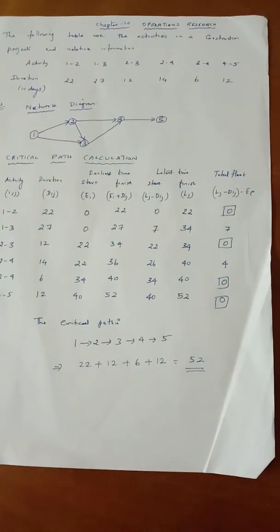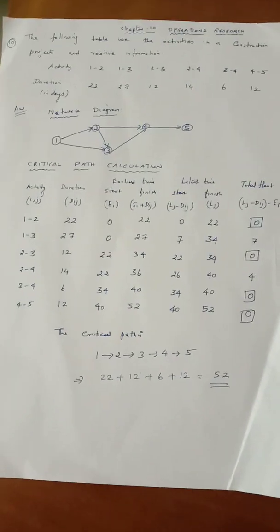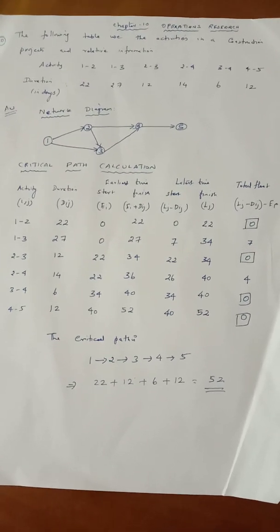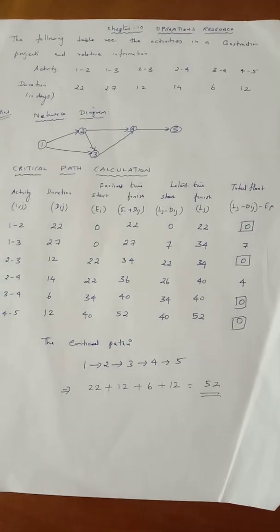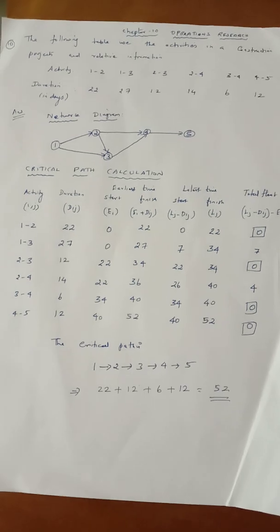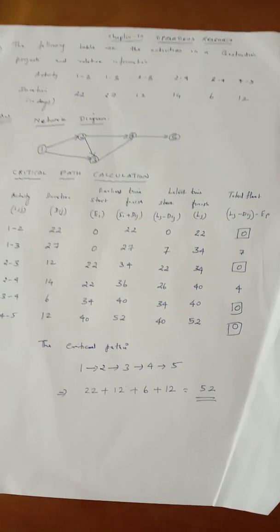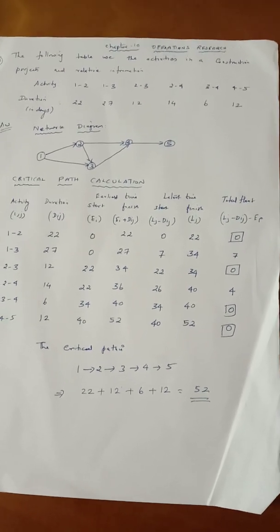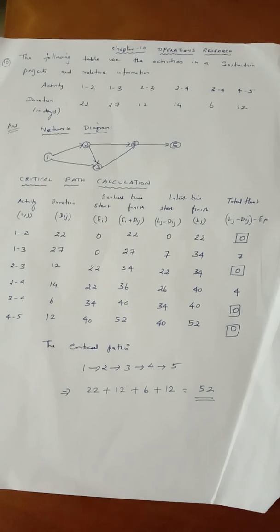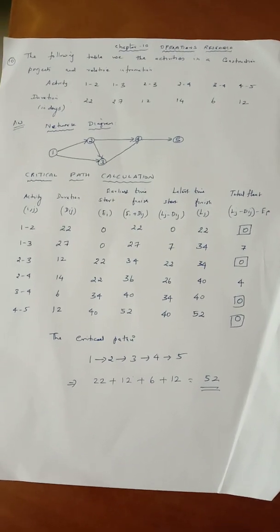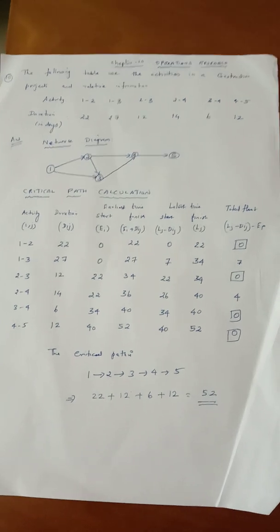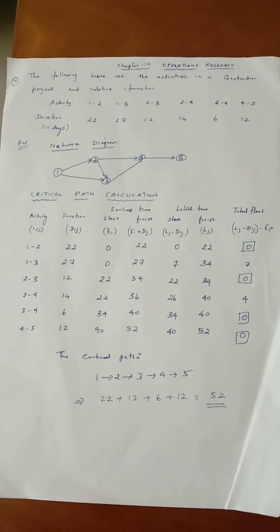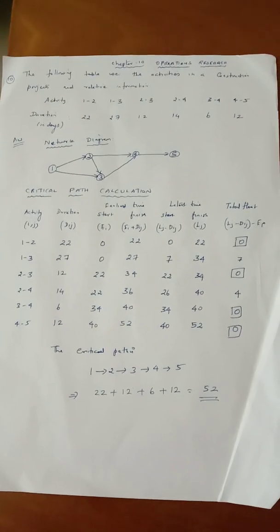Chapter 10, Operations Research, Sum number 10. The following table gives the activities in a construction project and relative information. Activities are: 1→2, 1→3, 2→3, 2→4, 3→4, and 4→5. The durations in days are 22, 27, 12, 14, 6, and 12 respectively.